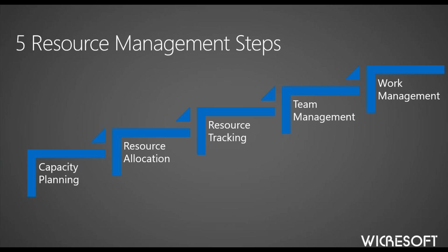When we talk about resource allocation, that's really getting down to saying, all right, I've allocated somebody to this project from a capacity planning perspective, but then when we start managing schedules and get down to specific work items and tasks within those projects, how are we going to allocate the resources we've been given to the detailed elements within those plans and then deliver on those things and complete them on a timely basis? And resource tracking allows us to do that, allows us to capture things like what we've completed as far as work efforts, actuals if we're doing time reporting and need to understand what that is, maybe if we're having to report billable hours, say, to an external customer.